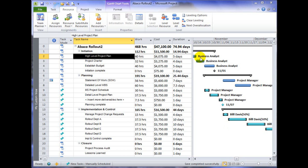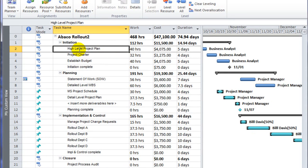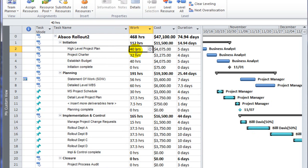So in this case, we have a business analyst assigned to the task high level project plan, and that has a work estimate of 40 hours. With a work estimate of 40 hours, that work is multiplied times the hourly rate to come up with the cost to complete that task.